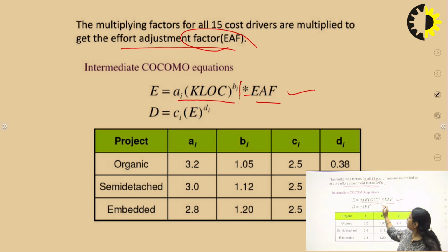With the help of this formula we found the effort in the basic model, but now we are multiplying with the effort adjustment factor in the intermediate model to improve the accuracy of the effort estimation. Fine. Now the question is how we can calculate this EAF.